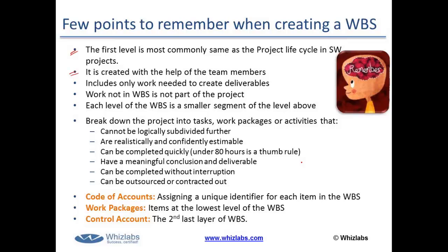We do not have to go back to the project team members telling them that this is the work you got to do. More importantly, it works as a very good team building tool, as it happens during the very initial stage of the planning process group. The team members would start talking to each other, and they would start working as a team. It includes only the work to create the deliverables. Work not part of the WBS is not part of the project. Each level of the WBS is a smaller segment of the level above.